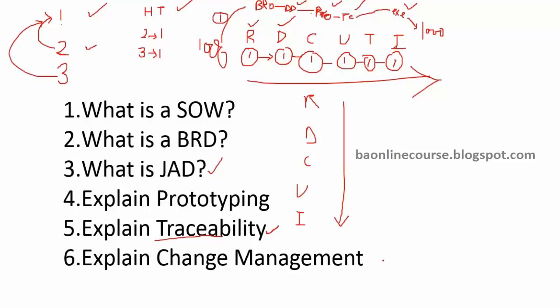Change management is when a customer asks for a change and the business analyst is asked to fill a formal written form, which is basically called the change request form. After this, we are supposed to analyze the impact of the change on the basis of how much it's going to cost and what's the effect on the timeline of the project. Once we figure out the impact and do an analysis of that, we send it to the senior management, which generally is the change authorization board, and they are supposed to either approve it or decline it.